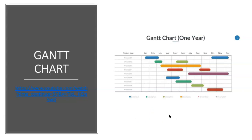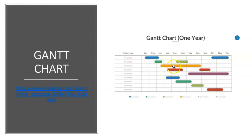A Gantt chart is a kind of bar chart that shows the period you're going to take. In this example, process one takes January to February and process three takes all the way from March to August. I find Gantt charts are most successful when people are doing group projects, because it may be that one person has to do something first and another person has to pick that up. However, I must confess I find them very confusing.